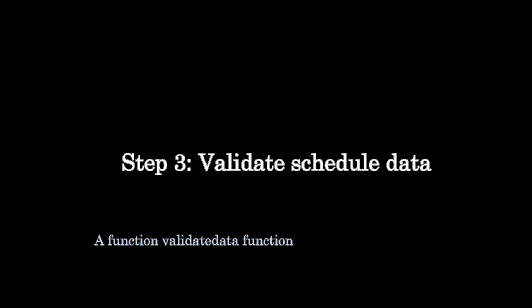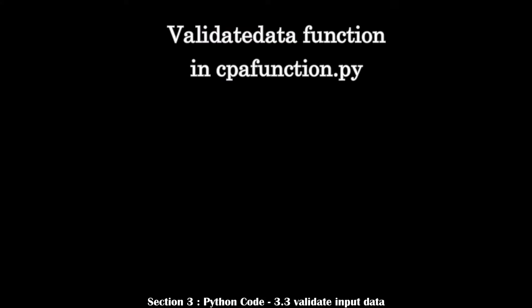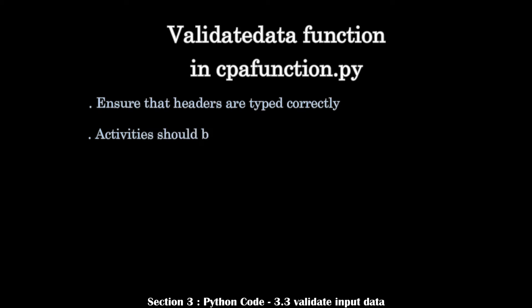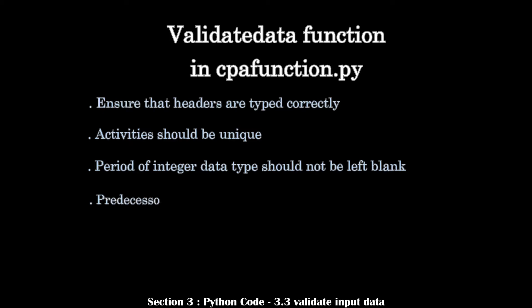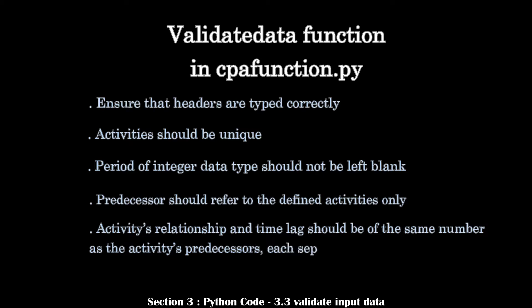To get around errors due to incorrect input data, it is necessary to validate the input data. The code is written in a function validate_data in cpa_function.py. Five validations are involved: ensure headers are typed correctly, activities should be unique, period (integer data type) should not be left blank, predecessor should refer to defined activities only, and activities' relationship and time lag should have the same count as predecessors, each separated by comma.